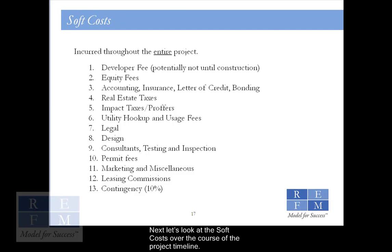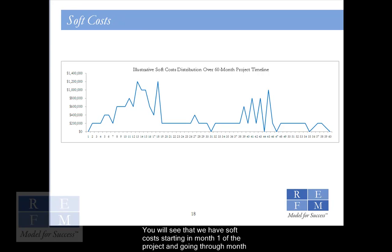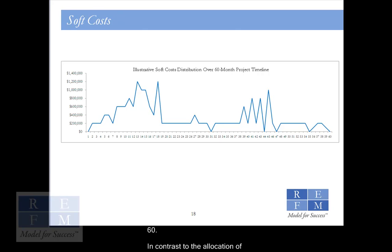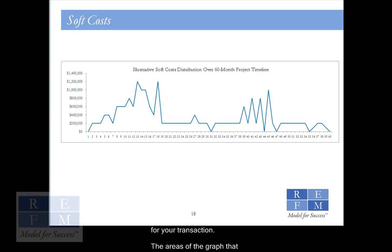Next, let's look at the soft costs over the course of the project timeline. You will see that we have soft costs starting in month one of the project and going through month 60. In contrast to the allocation of hard costs, there is no typical curve off of which soft costs are modeled. Each transaction is unique, and it will be the total soft costs in each period that end up defining the curve for your transaction.